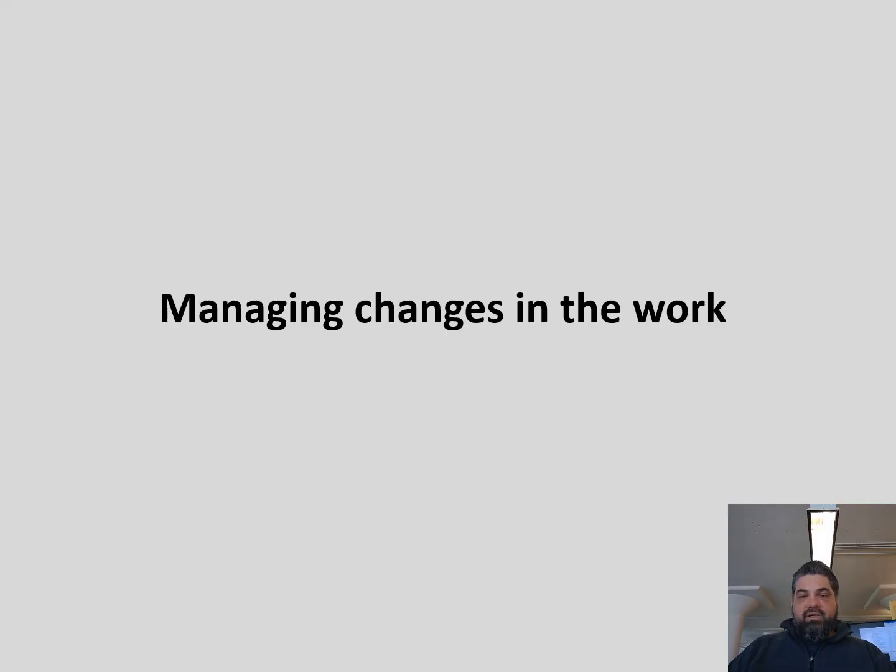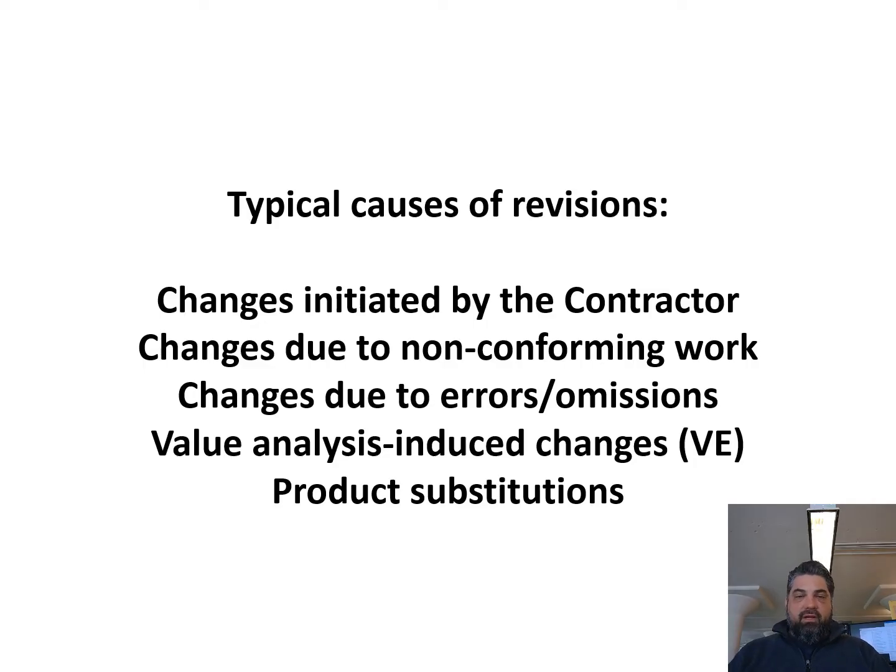So, managing changes in the work. There will be changes in the work, and those changes are typically caused by changes initiated by the contractor, changes due to non-conforming work, changes due to errors and omissions, value analysis induced changes, or product substitutions.